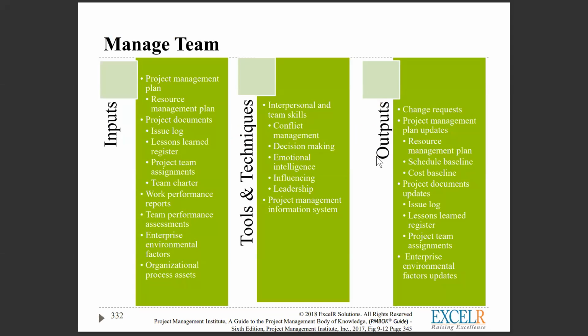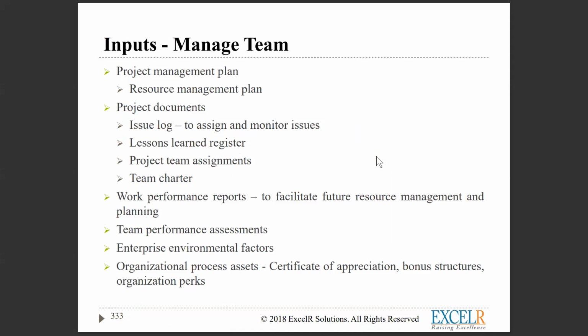So these are the manage team outputs: lessons learned and issue logs. In the issue log, you need to capture every issue and keep monitoring those issues. Issue logs cannot be only bugs. Any issue related to resources, hardware not coming, software not working, any issue, you just log it.